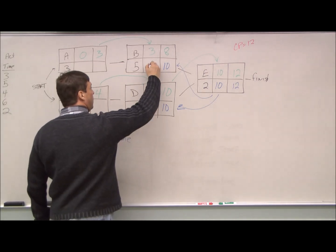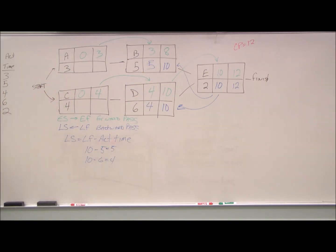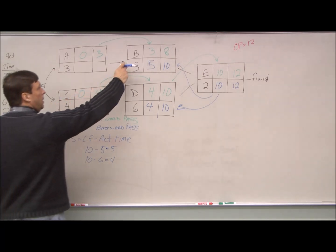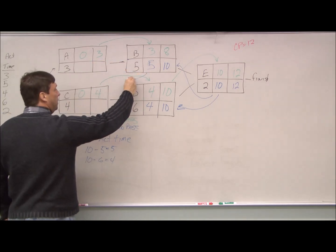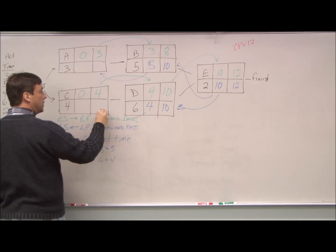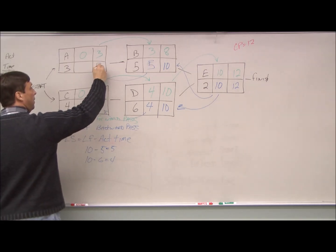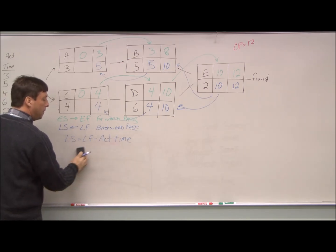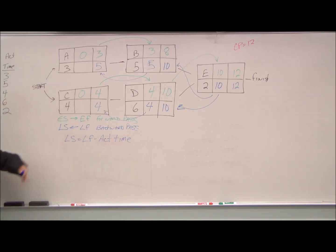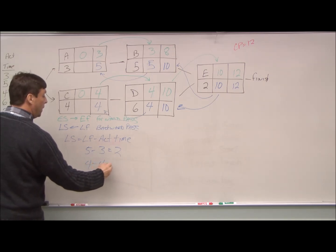So we have, whoops, almost wrote six in there. So there we have our two latest starts. B only has one immediate predecessor. So the time comes over here. And C only has one. So this comes over here. All right. So we have four and five. We do the same thing. We start calculating the latest start. Five minus three equals two. Four minus four equals zero.